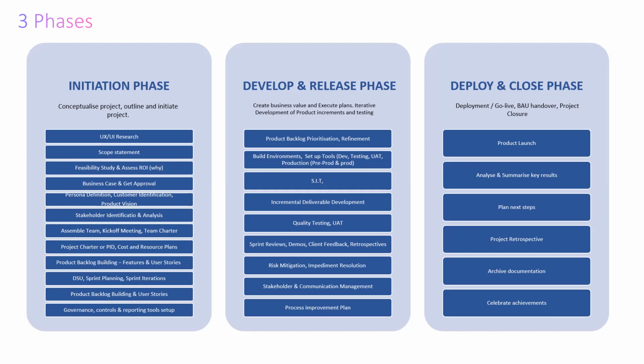It is dependent on the size of the project, because your PID usually has more information than the charter, and larger projects would tend to have a PID with more info than a charter. That's why we put it there, that it's going to be one or the other. That's why it's important for us to understand that project charter is not PID. Your PID is project initiation document.